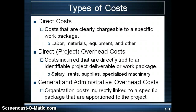Now we'll talk about some of the different types of costs within the project. There are three major types: direct costs, direct overhead costs, and general and administrative costs. Direct costs are costs that are directly charged to the project. This includes labor to perform the work, materials for the project, and equipment used to perform the project work. Materials would include anything needed to perform the work — for example, if you are building a home, all concrete, lumber, nails, electrical supplies, etc. are direct project costs.